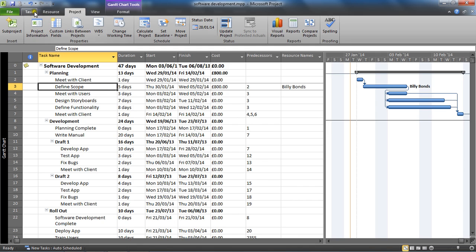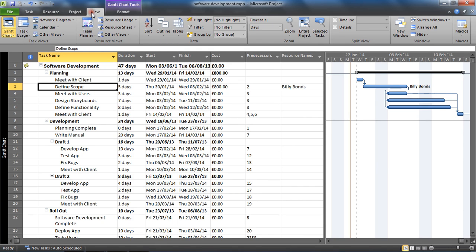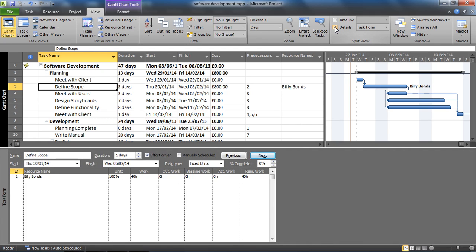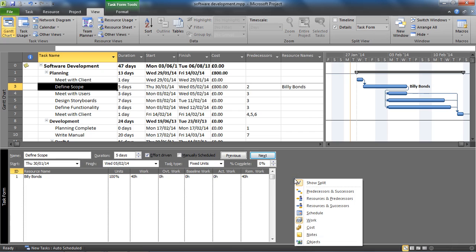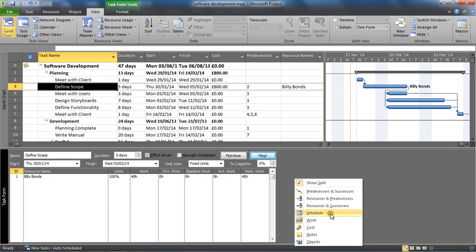To add in the overtime, I'm going to go to the View tab and check this Details box to the right to get this split screen and open the task form in the bottom half. My task form is already showing work information. If yours does not, simply right mouse click anywhere in that bottom half and change it to Work. It might be on Resources and Predecessors or Schedule.